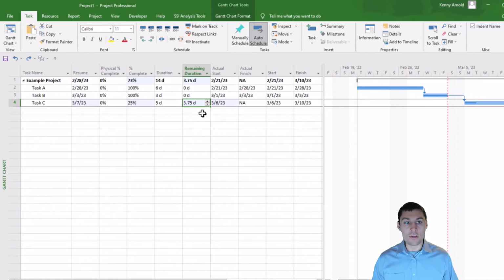If they're not whole numbers, then tasks will behave a little bit funny, and the time of day that tasks start or finish isn't going to be consistent with the time of day that the workday actually starts and finishes according to the calendar in Project.